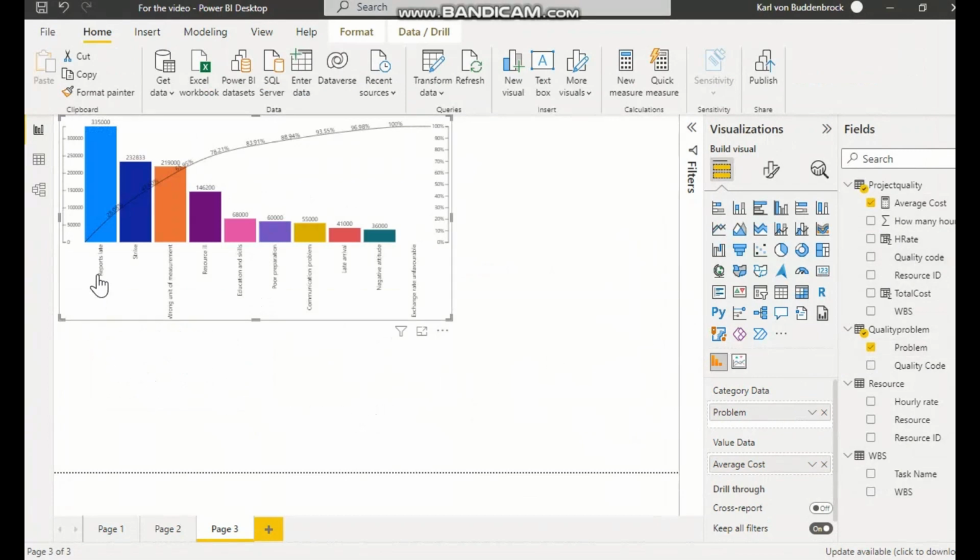We'll see the problems are reports that are late, and where the 80% cuts the curve and drops down, these are the major problems. What was that? Strike. Wrong unit of measurement was used. So those three are definitely the vital few in the Pareto distribution.